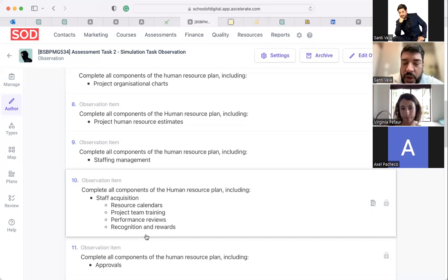So the project sponsor has to be someone working in the organization. Why? Because that is the person that is accountable. So we always need a hook to the company. You may have everyone, but not the project sponsor, be outsourced. Because we need someone to be accountable, and the project sponsor is accountable, whereas the project manager is not accountable, but is responsible for the project.